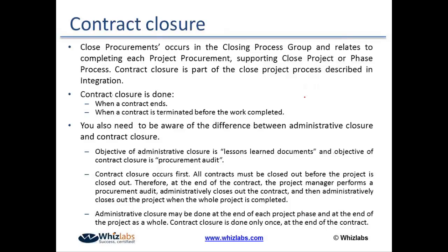During the closure phase, the project manager would be doing mainly two things. One, the project manager would be involved in contract closure. Contract closure includes the contractual closure part, that is, perform an audit of the deliverables, find out whether the deliverables are within the acceptable criteria or not, and then accordingly close the project, complete the payments and close it.